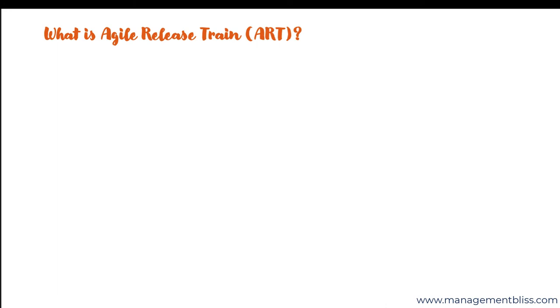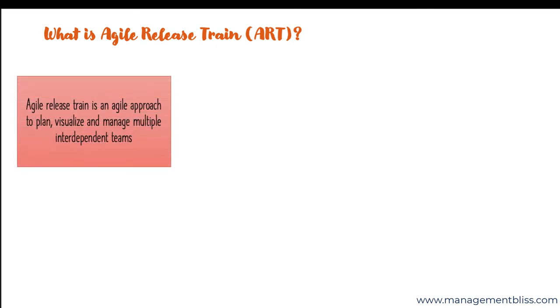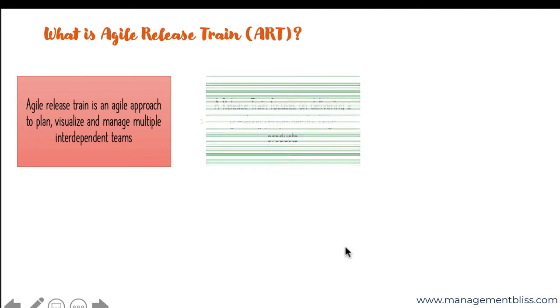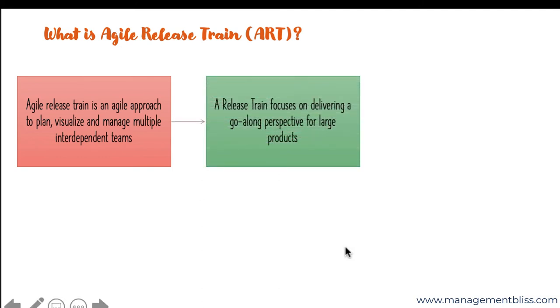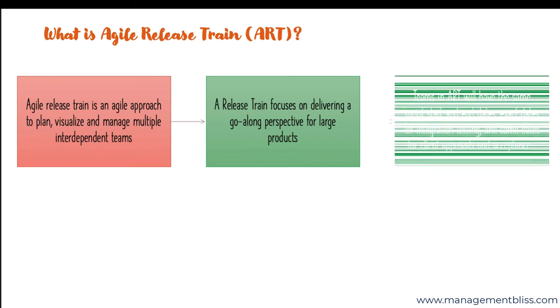What is Agile Release Train? Agile Release Train is an approach to plan, visualize and manage multiple teams. The Agile Release Train method provides a tempo to many groups for frequent and foremost synchronization. A Release Train focuses on delivering a go-along perspective for large products. Teams in a Release Train will sync with each other and have the same sprint start and end dates, exact dates for integration testing, and same dates for client approvals and acceptance testing.